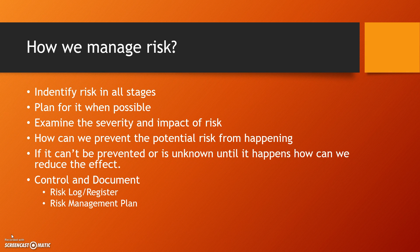This happens in all stages. I keep a risk log or risk register, and with each project there's a risk management plan that says if we identify a risk, does the change committee need to meet, or is this handled by just the project manager. You always want to plan for risks if possible. For example, after we had the first delay on that project, we planned for assigning other secondary projects to the staff that were waiting for the client. Those projects weren't as time-sensitive so they could be done as needed, which basically didn't create idle time and additional costs on this project.